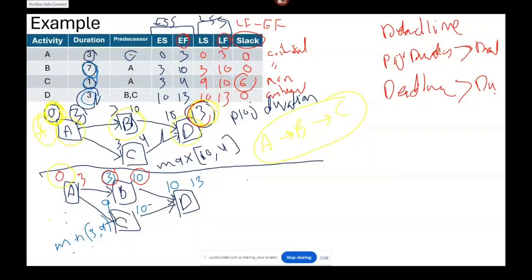This means that for each activity in the project, we have a spare time of two. Each activity can be delayed for two units of time. Then, if one of the activities used this slot of time, then all activities should return to become critical activities.